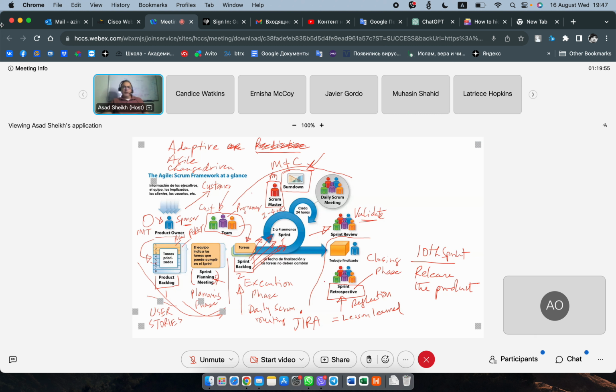So what do they do with the 5th one? Well, the sprint is over. 4 weeks have passed, and they still haven't completed all of it. 1 is still remaining, so they'll put that 1 back into the product backlog, and then they'll start the next sprint. They're going to go back into the backlog and pick another 5. The one that they put back, they may either pick for the second sprint, or they may not.